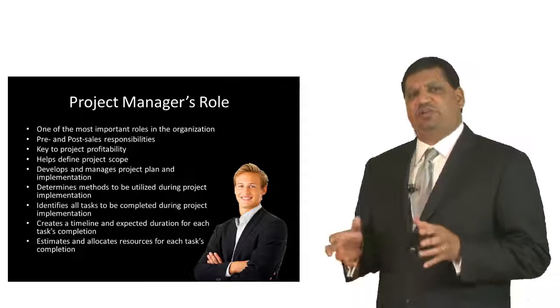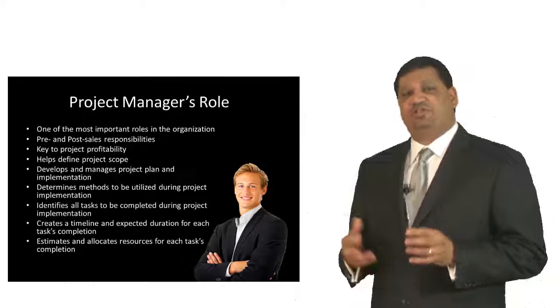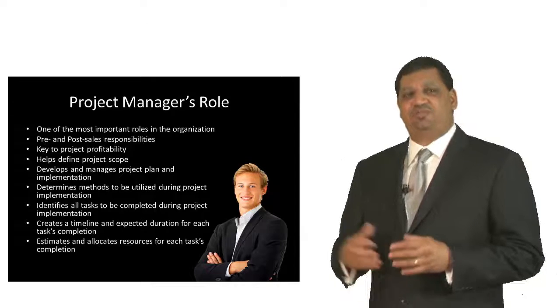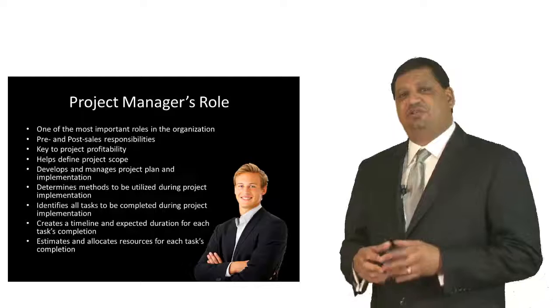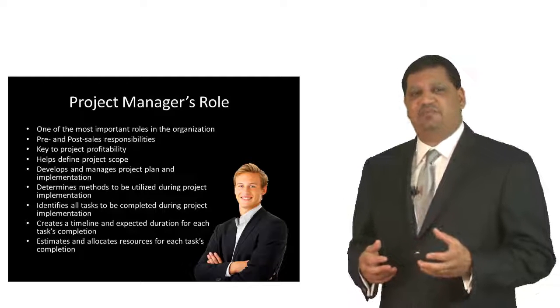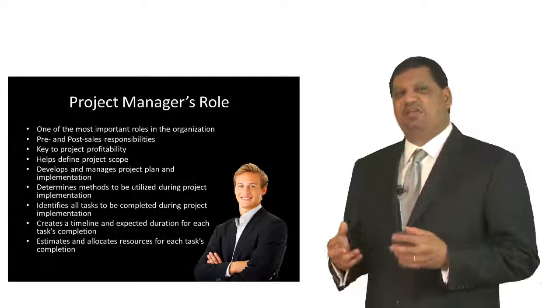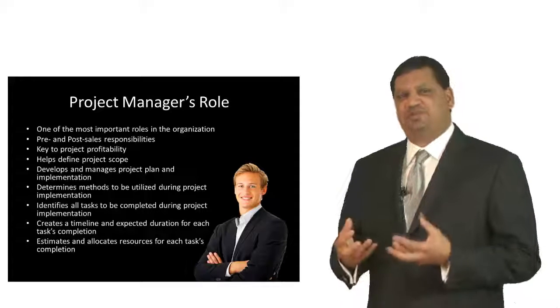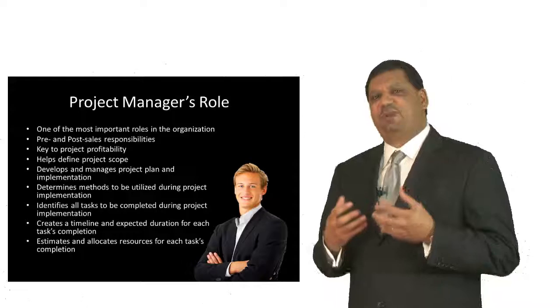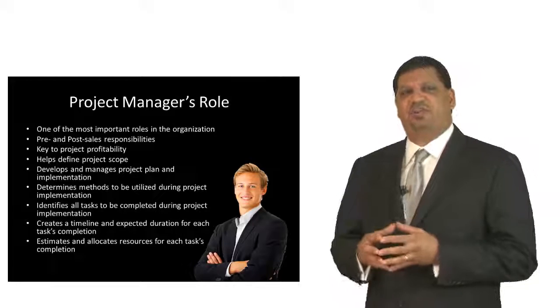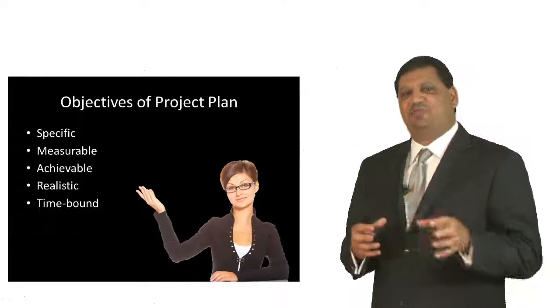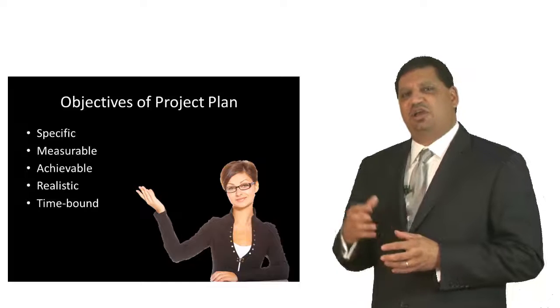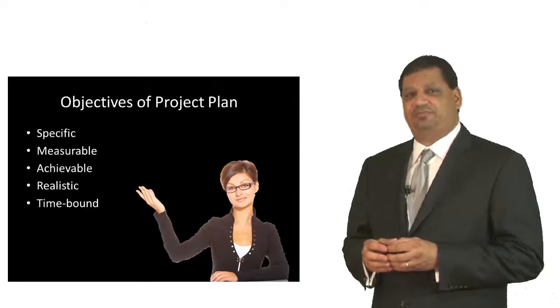They help define your project scope, they develop and manage the project plan and the implementation strategy behind it. They determine methods to be utilized during project implementation. They identify all tasks to be completed during project implementation and every phase that each of these tasks rolls up into. They create an expected timeline and duration for each one of these tasks, and they assign resources for the execution of each of these tasks and hold them accountable.